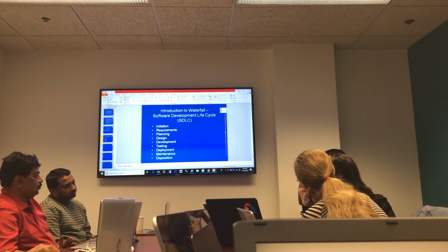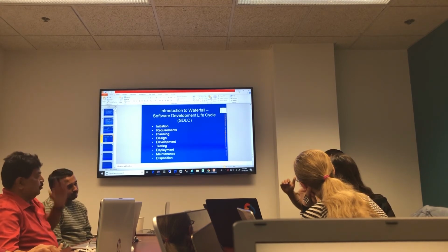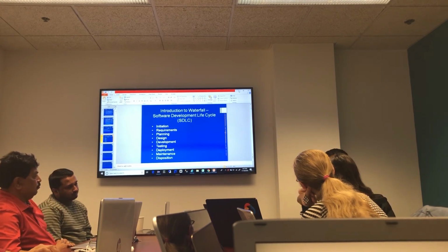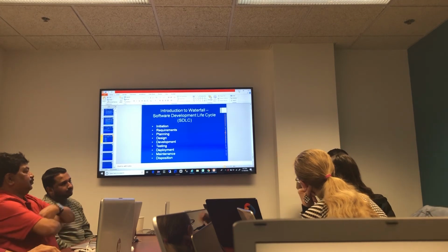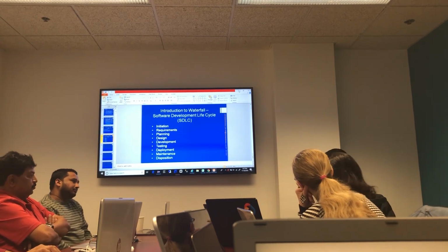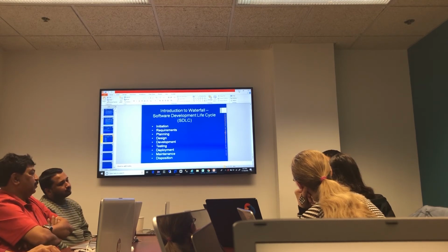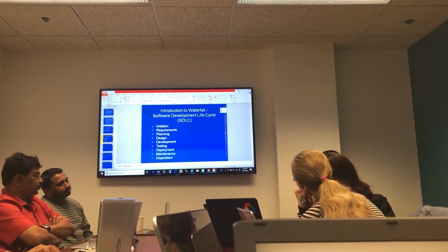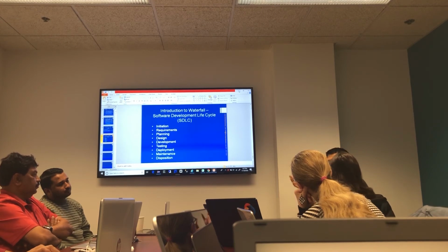So the new functionality requirement is written by the BA. It is reviewed by each team. They come up with, start all over, only for that functionality. That this is the effort involved, this is the time frame. So you tell the client this is how much more it will cost you, and this is how much more